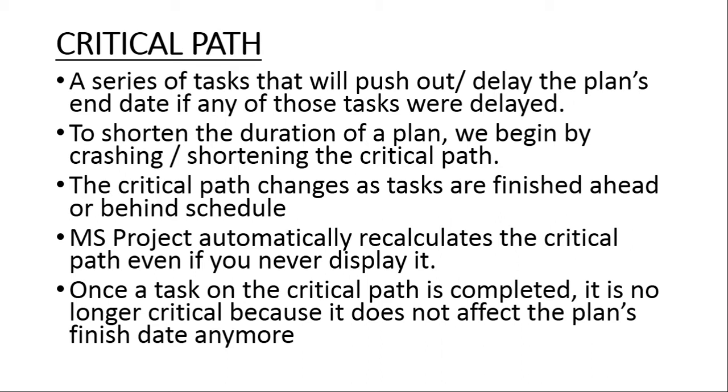On the other hand, if we finish a particular task one day late, it means we've delayed the next task by a day, and because of the domino effect, it will delay all the other tasks until the finish date or end date of the whole project also delays by a day.